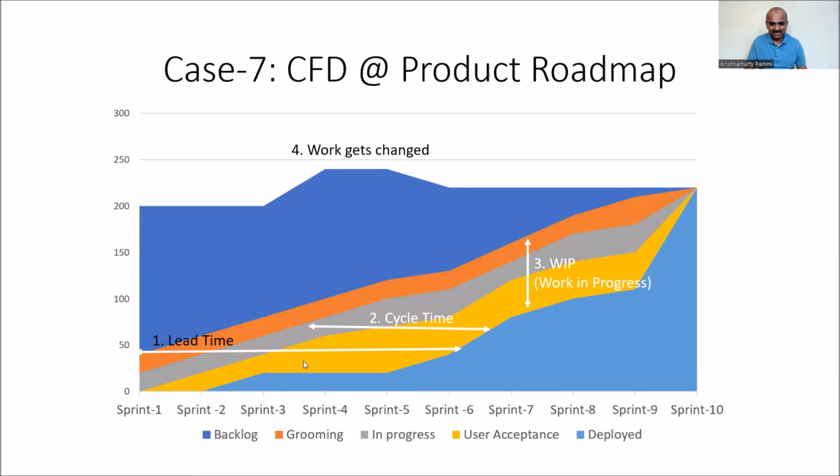So you can see the trend, and you can also explain to the stakeholders, we are not able to meet because the product has not converted the user stories into groomed user stories. The ready for development user stories are not available for us. Because of this, we are not able to kickstart the development. And because of that, we are not able to deliver you the minimum viable product.